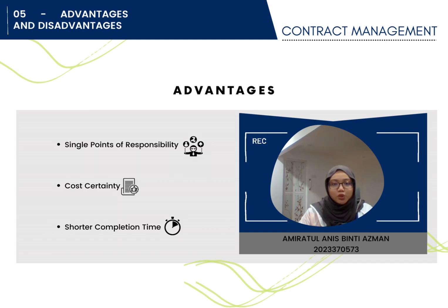To help the owner to choose the best project option, the contractor may provide the cost estimates for a variety of the design options. The collaboration between the client and the contractor can help in discovering the opportunities for value engineering or potential cost reductions, in addition to lowering the project expenses without compromising the quality.